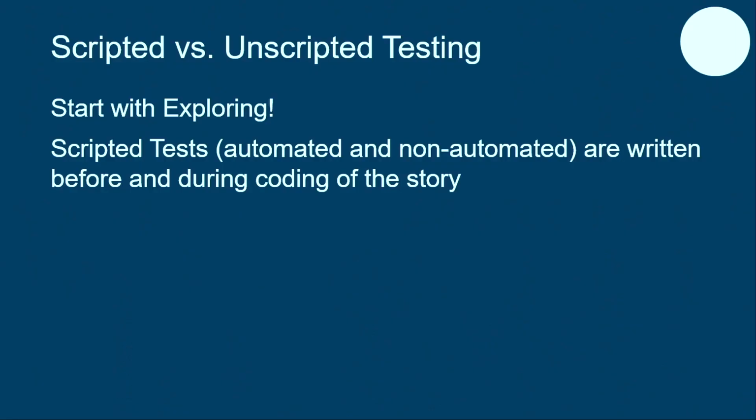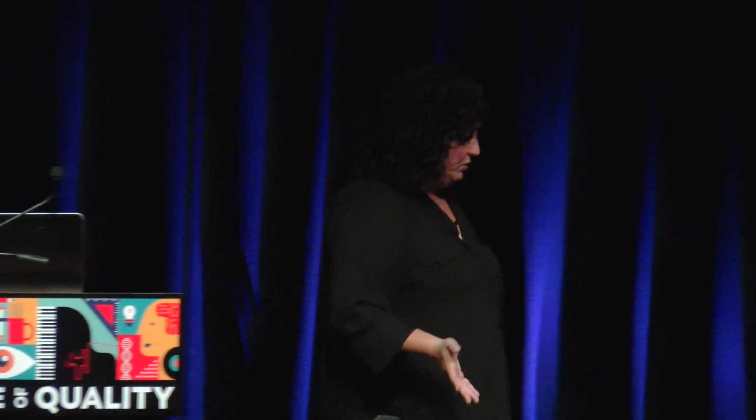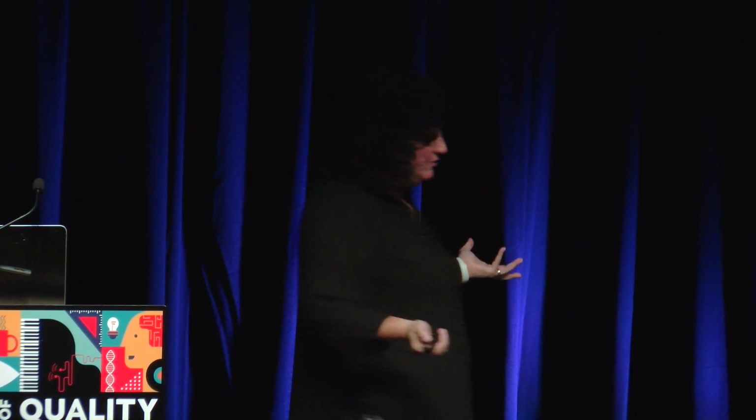So the way that we do that is that we are writing those tests while the development is happening, and by the time that story gets to us, the satisfying of the test cases is already done either by dev or collaboratively with dev and QA, so that the story isn't technically ready for QA, or not really ready for us to explore, until we can see that all of those tests have passed before we actually start doing the work, right? Again, very modern approach, but you'll see a much higher quality of the code being delivered than we've seen previously, because we're putting that more modern edge of the activities from a traditional role into a modern QA. So development is referring to those tests throughout.